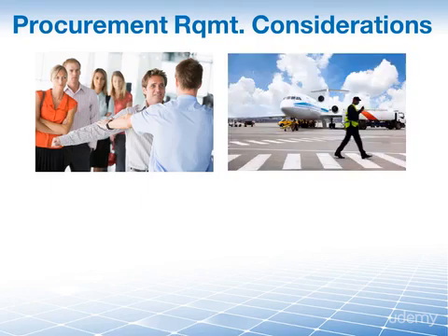Second, safety. Talking about airplanes here. If your project were about repairing aircraft, I can guarantee you that as part of the requirements, you'd need to be able to trace the origin of any part that you buy and will be put on that aircraft. You'll require your vendor not only to deliver the part itself, but also to provide the supporting paperwork substantiating its origin.